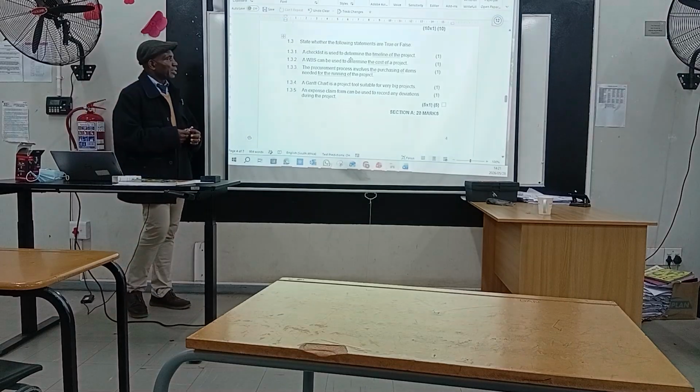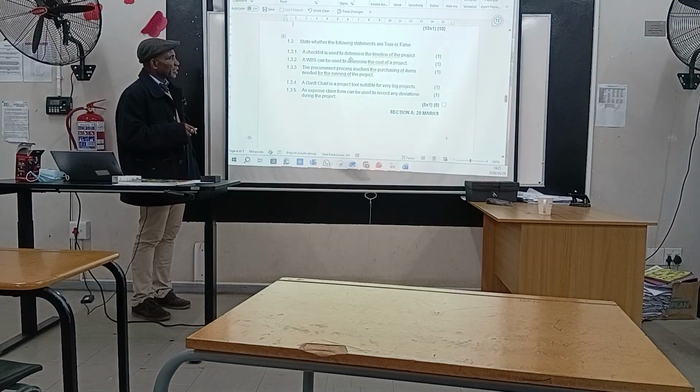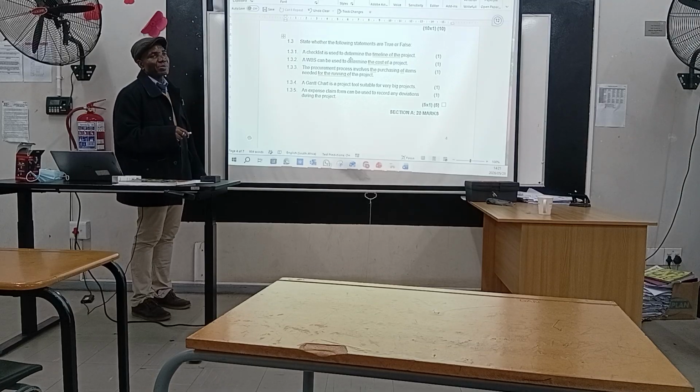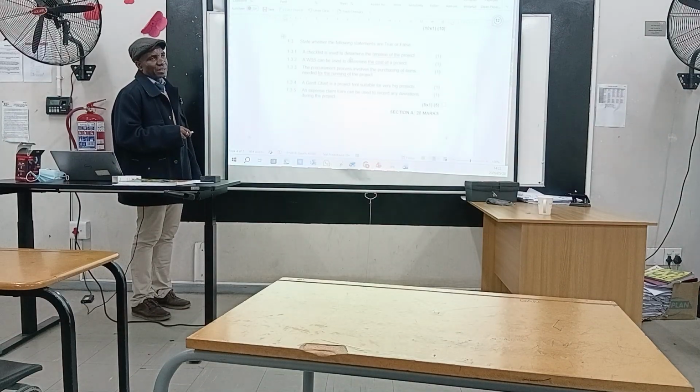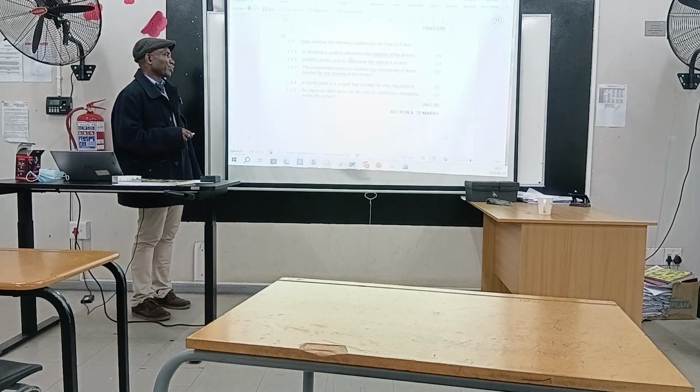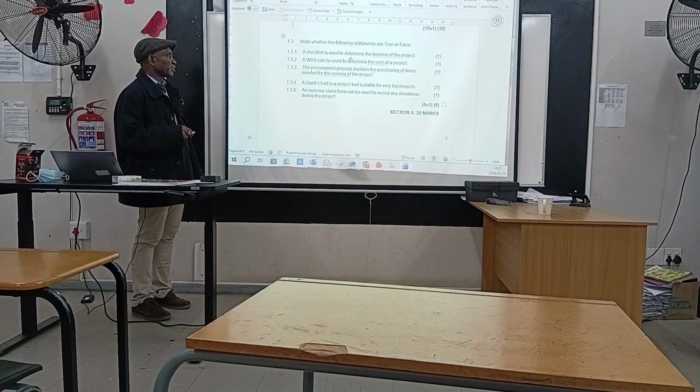Okay. Yeah. Then, as we said, a checklist is used to determine the timeline of the project. Like I said, we don't use a checklist to determine the timeline of a project. We use a Gantt chart. So that means that question is false. Then a WBS can be used to determine the cost of a project. Of course, you can use the WBS to determine the tasks or activities that need to be done in the project as a baseline. Then from there you can estimate. So it's part of it. By virtue of that, we can say this question is true.